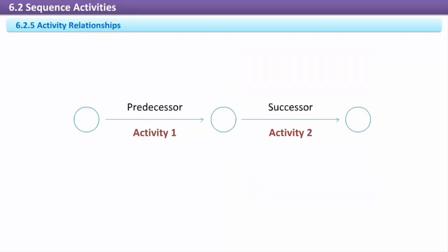Activity relationships. Activity relationships are another restriction that affect the order of activities by establishing the start and finish relationships between successor and predecessor activities. If there is any unusual logic to the relationships, it should be documented on the activity attributes document as well as through narratives on the project scheduled network diagram or on a supplementary document to the diagram.